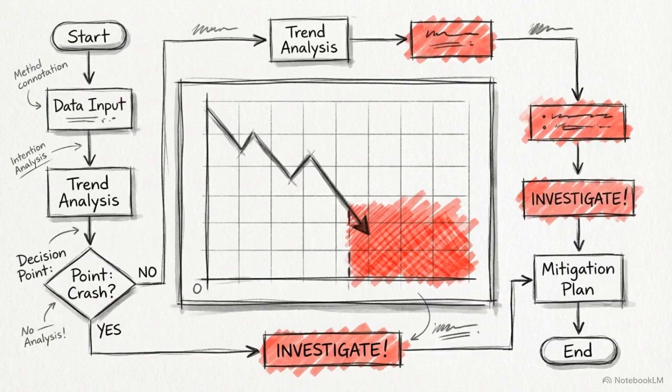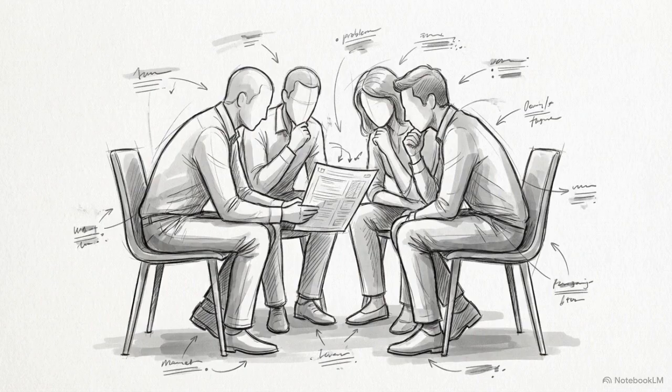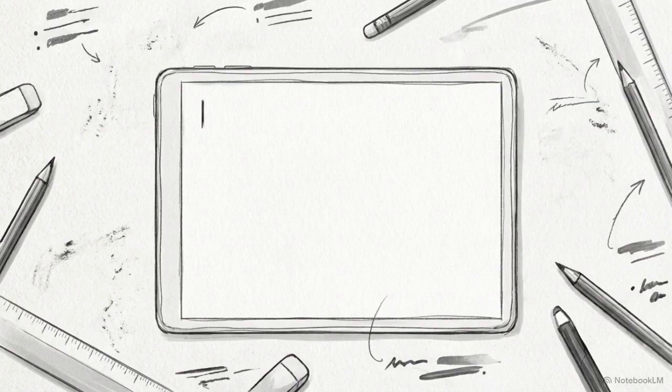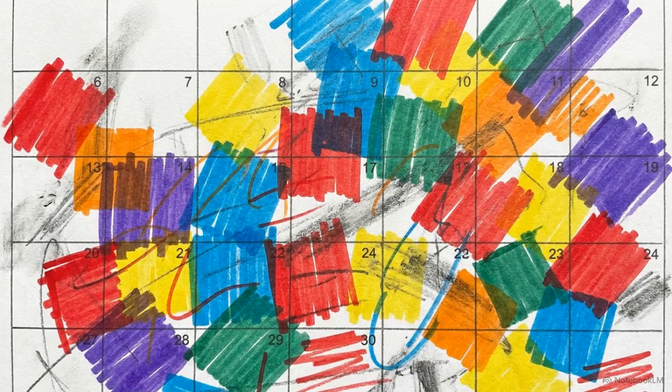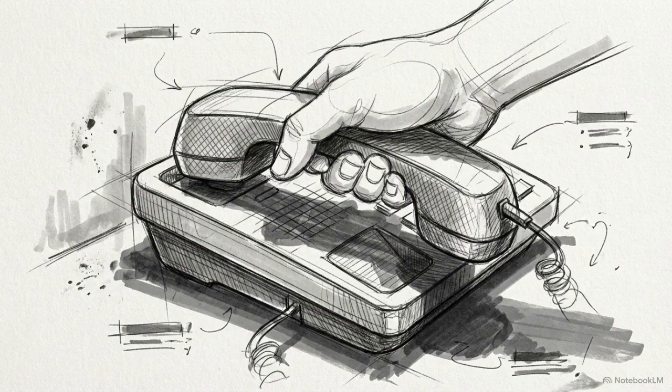For question 9, address what happens when a team fails to complete their sprint items. Your response strategy here must focus on performing a root cause analysis during the retrospective, rather than assigning blame. In your cheat sheet, explicitly list the potential failure points you would investigate. Note down overcommitment during planning, poor backlog refinement, or an increase in external interruptions.